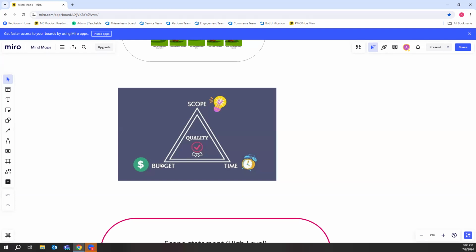It was completed successfully, with the understanding that it's a traditional project, which means they got all the scope that they wanted, but they had to be flexible with the budget and the time. On an agile project, the scope is very flexible, but the budget and time is fixed. Okay, I'll explain to you how that works when we get to the Scrum stuff, but that's the difference between the two, and that's how you know, generally speaking. There are exceptions to the rule, but that's how you know when something can be an agile project and when it has to be a traditional project, is when scope is fixed.